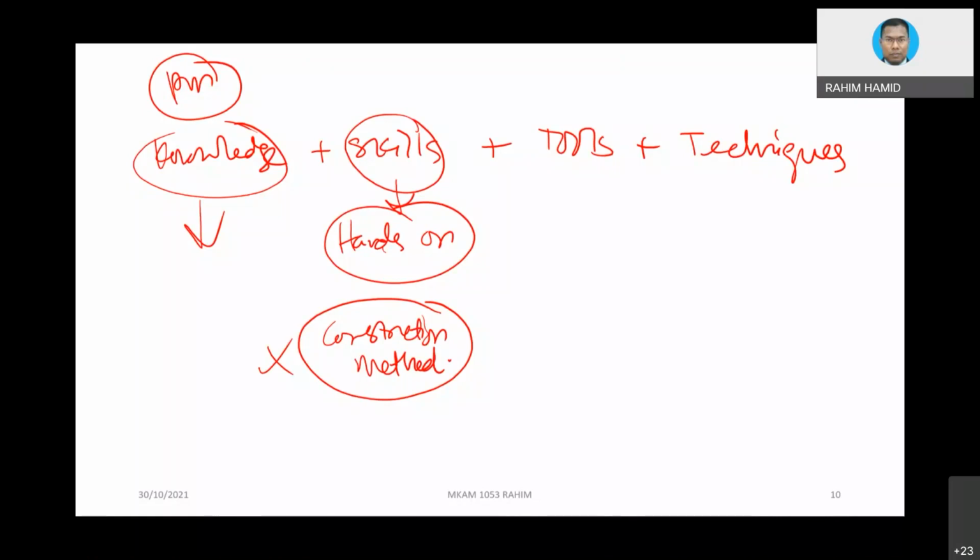And among the construction methods, there could be one that is at minimum cost. We are always concerned about cost, okay? And in construction method there is basically the work sequence. This is another issue. This is what we call WBS. We need to develop the WBS in order to know the interconnection between one activity and another in terms of logic relationship. And again, those kinds of things might not be available in the textbooks. What is WBS? Work breakdown structure.